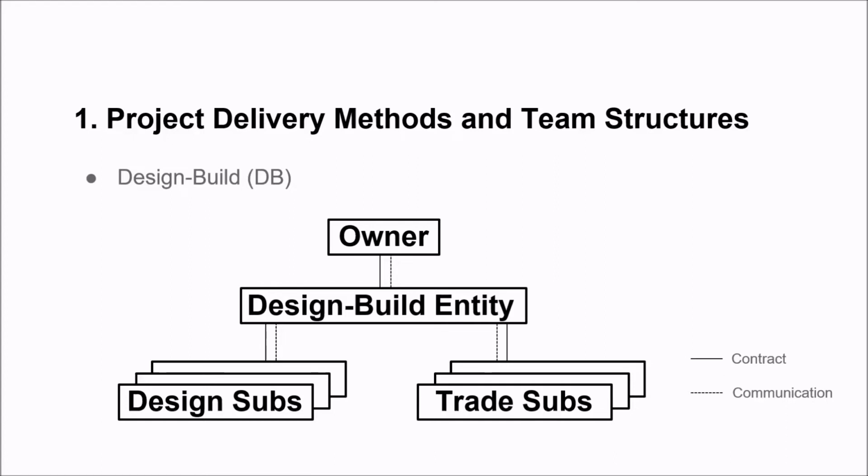Design often is managed through owner approval of design documents during performance. While some design elements may be specified, typically the contractor is given flexibility in design. DB is an increasingly common delivery method, especially in California. According to a report from FMI, it is predicted that in terms of construction put in place spending from the 2013 to 2017 period to the 2018 to 2021 range, DB's prevalence will increase from 39% to 44%.